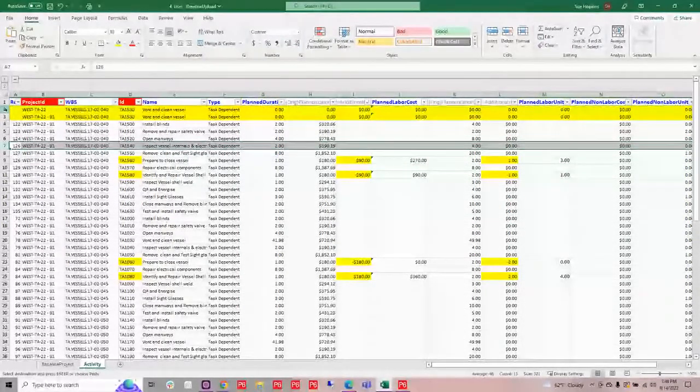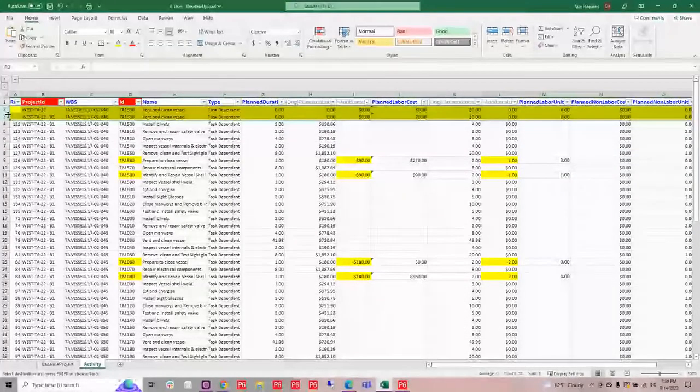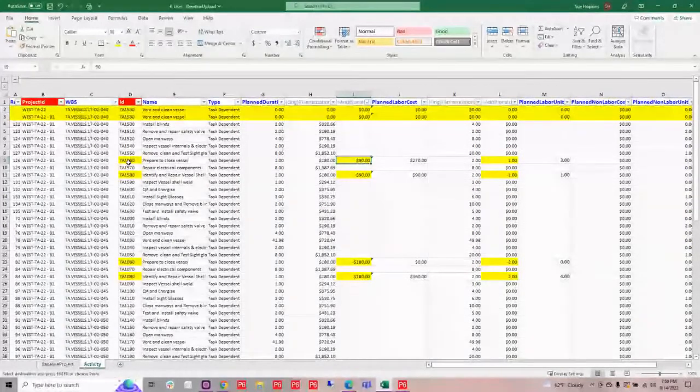So with my found work, I am going to add it to both the project and the baseline. Obviously, I'm not going to add any costs or units with that. It's just found work. And then I'm going to redistribute between 50/60 and 50/80. I'm going to debit and credit 90 dollars as well as 1 unit. And then at 1060 and 1080, I am going to credit and debit those for $180 and then 2 units each there.